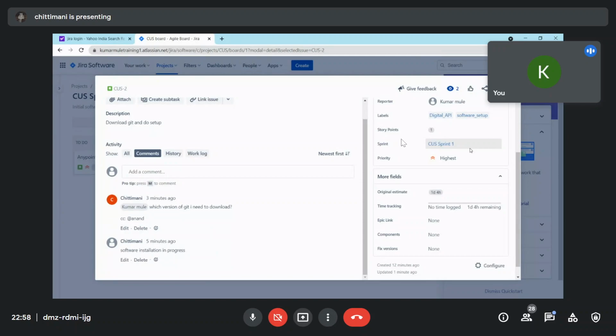If you got a new requirement of moderate level, that will be 5. If it is moderately complex, then 7. If it is complex, then 9, 11, and so on. Based on your complexity you need to define the story point.